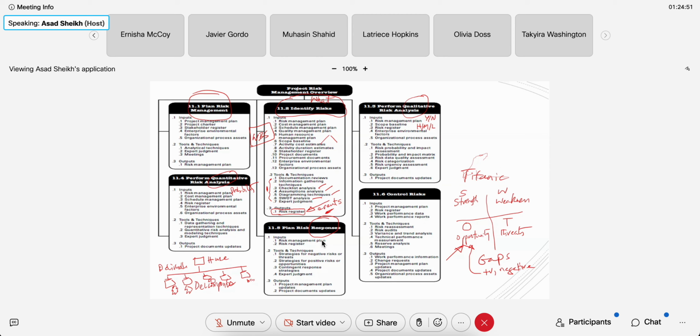And so we put indicators in the risk register sometimes, which can automatically trigger us about events that may be happening or coming up. If, for example, we had a system connected directly to the weather system, and the weather was worsening or turning out to be bad, it would send a signal to the risk register somehow, and the risk register would send an email to the team: hey, watch out, bad weather is coming, be alert, come up with mitigation plans because bad weather is on the horizon. All right, so that's all about controlling.